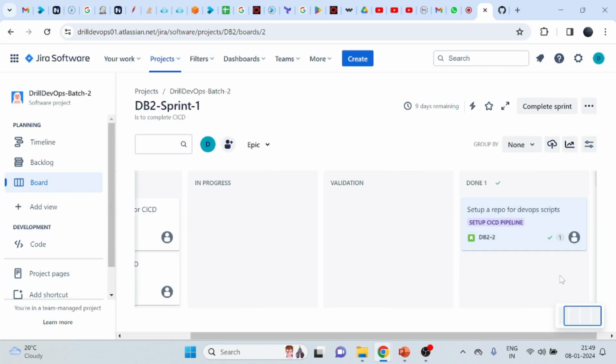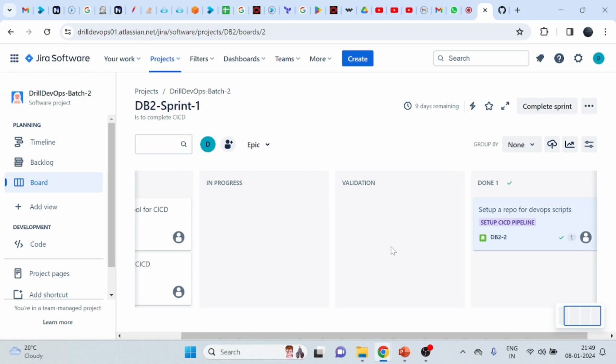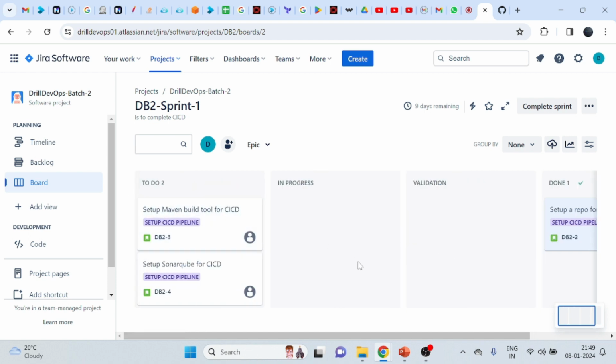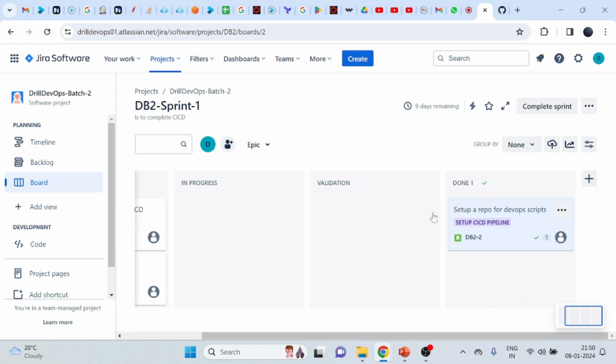Like this, this is how a sprint happens. Every day at stand-up, we will open this dashboard. During sprint planning, we will complete the sprint, update, and take the new tasks. If some tasks are still pending, they are moved to the backlog, which is the next sprint backlog, and then moved to the next sprint as in-progress tickets. And again, people should work. Once that is done, they will move them to done. Like this, we will be done.